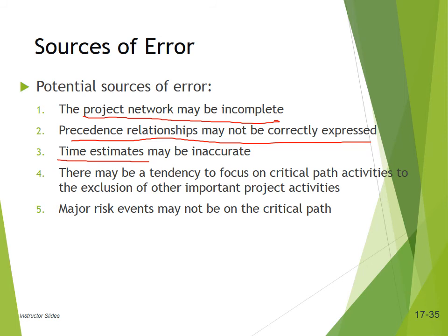There may be a tendency to focus on the critical path. Again, that's not a good practice. As I said before, if all your attention goes to the critical path, non-critical activities can finally turn into critical activities, and in that case you will have a number of critical paths which you have to deal with, which is risky.